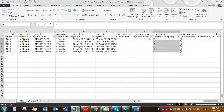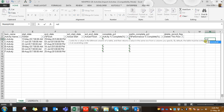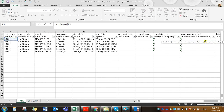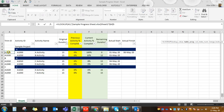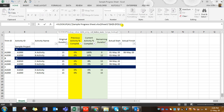In this sample project we have only six activities, but normally you may be updating hundreds or thousands of activities in one go. So we use VLOOKUP in Excel. Select the lookup value, go to the sheet where we have the data, select the array from Activity ID to the column you need — in this case Activity Percent Complete — and enter the column index number, which is 6, then 0 for exact match.